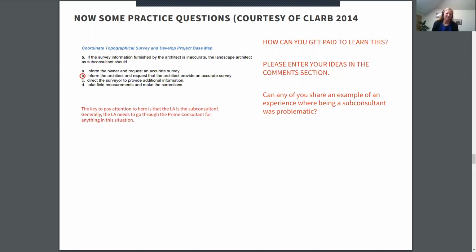It was when you talked about the compensation for the contractor, and I was also referring to my work with the government, when we had to compensate the contractor many times based on the client's modifications that caused additional cost to the project or more work to be done. So we provided them with time extensions. Mm-hmm. Yeah, clients changing their minds tends to add cost to a project for sure.